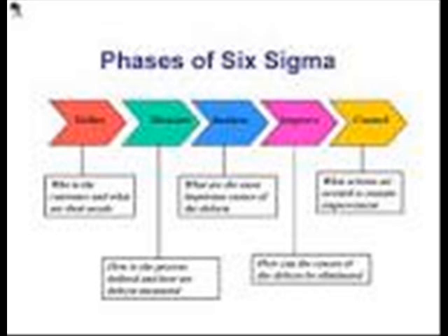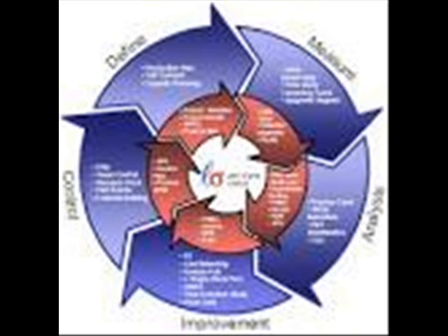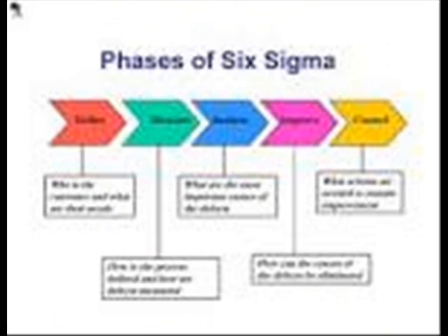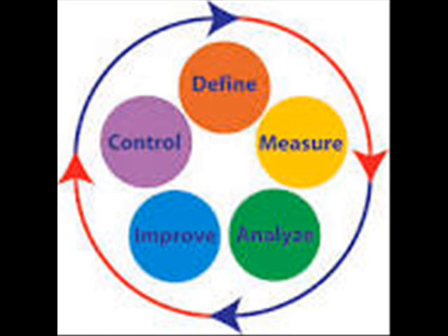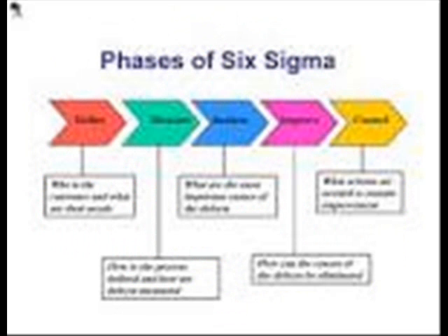Once this is done, then we should develop the deliverables, which refers to the output of the project with the standard segmentation about the expected outcome. It should be followed by developing an initial schedule and project milestones. Finally, the stakeholders should be defined and the team should be assembled. Once all these things have been decided, then a kick-off meeting is required, which is a comprehensive meeting about taking up the decisions.